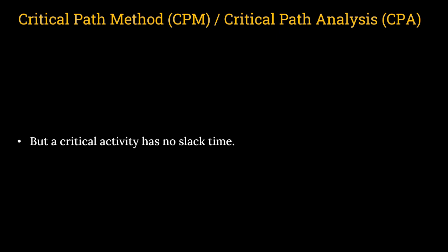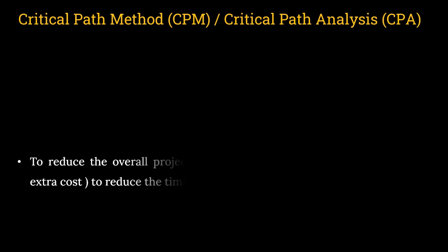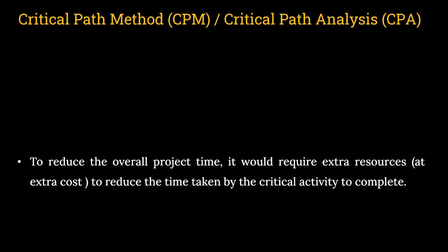But a critical activity has no slack time. To reduce the overall project time, it would require extra resources at extra cost to reduce the time taken by the critical activity to complete. Try to understand that there are certain paths which are critical.